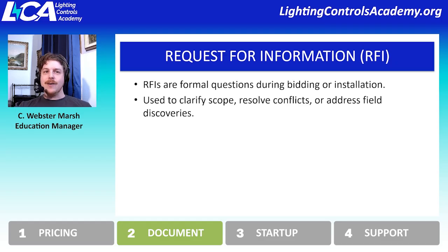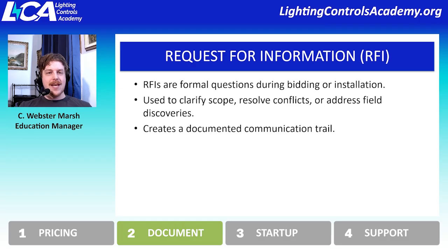So having RFIs really is a great way of tracking that documentation and making sure that, okay, in RFI number 43, we said this, and that did not get captured in the updated bulletin. It should be captured in the next bulletin. That way there's continuity with the information that's being asked for.